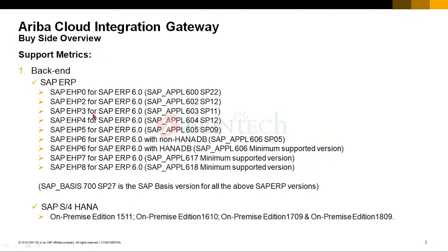But generally, what happens during implementing any Ariba solution is that, initially, before we start our prepare phase, we have to conduct a system architecture review meeting with the client, and you have to use a template for that. I will show the template once again in some time.